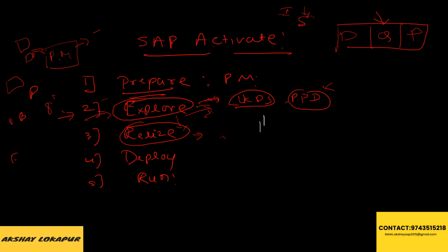So we have prepare, business blueprint, realization phase, final preparation, and then go live. In final preparation, during testing and user training, only then do these people have access to the screen. But here, in the realization phase also, while we are doing configuration, they can see it. We'll hold regular stand-up meetings, and we'll hire a Scrum Master.